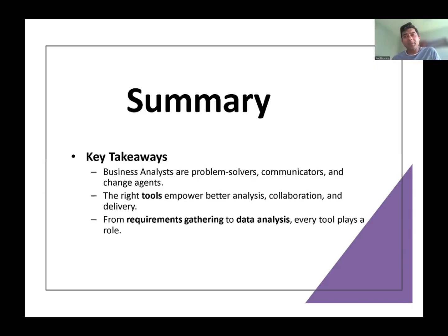In the sprint refinement, maybe your user story is complete. So then, if a user story is complete, then it's good. It goes to the next Scrum ceremony, which is sprint grooming. If the user story is not complete or the developer has some questions, they will go to ask you questions. You might be able to answer them. If you are not, then you have to go to the stakeholders and get those answers and complete the user story. Once the user story is complete, you bring it to sprint grooming.